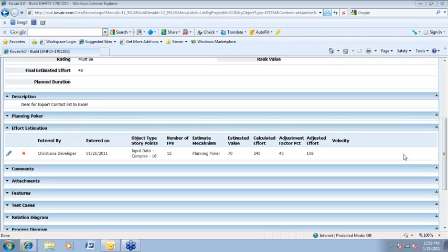Sorry, Shominol, another question? Yeah, so the next question is, can we assign multiple resources for a task and have a different number of estimated hours assigned to each resource? No, in that case, you have to create 2 different tasks for 2 different users, because the task is the lowest unit on the whole, and if you are allocating a planned duration for those tasks to complete, then it has to be in 2 different tasks altogether. It could be generated from a process, or it could be manual tasks that you can allot in Kovair for the different owners.